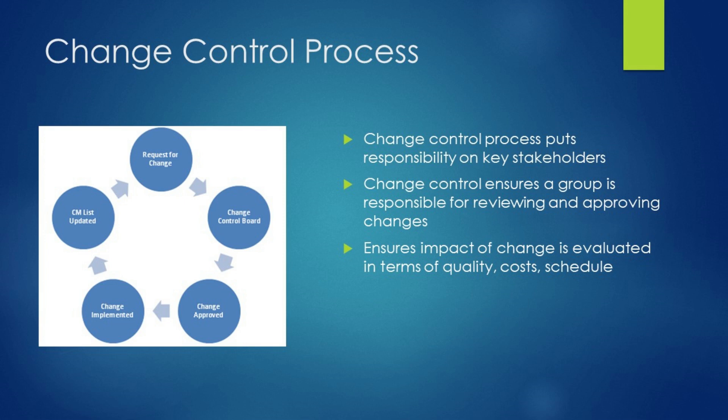One benefit of a change control process is that it serves as a check and balance that the project manager is not operating in a vacuum. Another benefit of a change control process is that the responsibility for decision making is shared, as all requests to deviate from the initial scope of the project have a detailed request submitted that is vetted by the project's senior leadership. As part of the vetting, the project's leadership should not just review the core ask but also the risks, costs, and resources associated with doing that work.